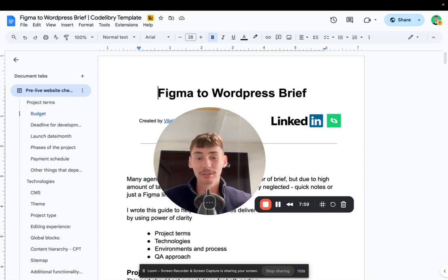You still have a buffer which we allocate for our team to work on feedback from a client of our client. Because they ask, okay, can I change this? Can I change that? We also need to do this and that. And of course, this will increase the timeline. And if a few teams are dependent on this website, like an SEO team, ads team, whatever team, everybody should be in the loop. Everybody should have some buffer.